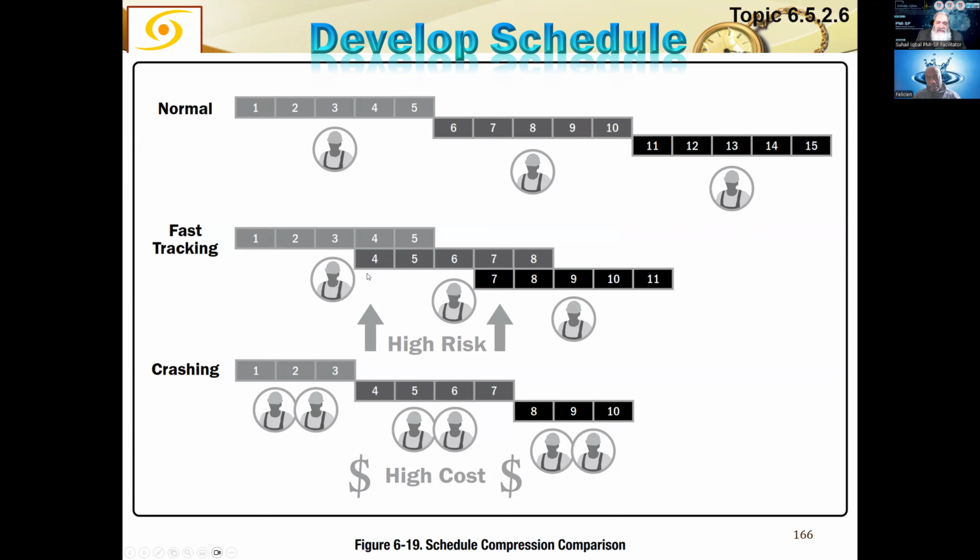If we can somehow overlap these jobs, I pull this middle activity 2 days earlier and this activity again 2 days earlier, we will end up doing all the work in 11 days, with an overlap of 2 days in every activity. I can do this job in 11 days rather than 15 days, if it is a matter of just squeezing the schedule.